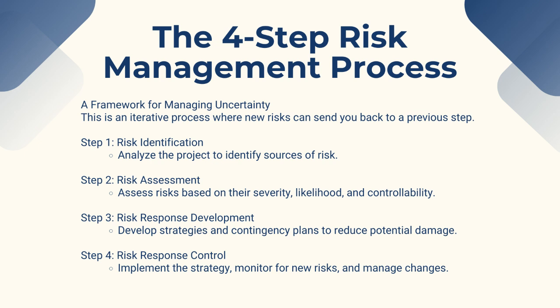Then comes Step 3, risk response development, where we create strategies and develop contingency plans to reduce any potential damage. Finally, we have Step 4, risk response control. This step involves implementing our strategies, monitoring for new risks, and managing any changes that arise. It's important to remember this is an iterative process. The discovery of new risks at any stage can loop you back to an earlier step.